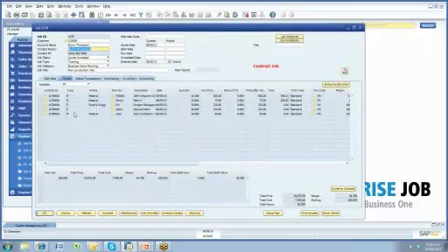Okay, so what I'm looking at here now is the quote for my job. Because I'm at the overall job level, I'm seeing the quote entries for all sub-jobs, and I only have one sub-job. So I have some materials here that I said I want to use on this job, so I have quantities for those. There's quite a bit of flexibility around what my costs and my sell prices are for staff and for inventory. So for example, for a staff member, I could have a specific rate that I sell that staff member out at, Sophie.